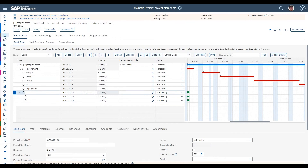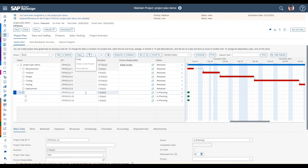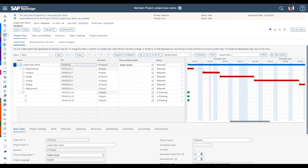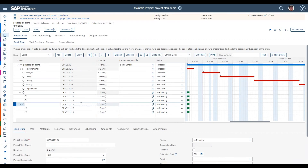The last element for creating your task list is the copy function, which is only available in the Gantt chart view. If you've defined tasks with a similar structure repeating throughout the project — perhaps with different timelines, durations, or people involved — you can set up that structure with all its durations and dates, then easily create a copy. Select the section of tasks, choose copy, specify the project and the parent where you want to paste, and a new identical section of tasks will be added below.